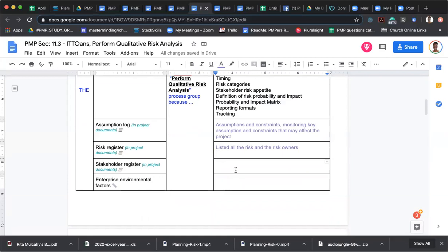Stakeholder register. It will contain the details of the stakeholder, but then also it will contain who might be nominated as a risk owner. Actually, that is where this would come in, rather than the risk register, because the risk register would be more to do with this thing. So we could probably make a change over there, Tasha. The risk owner part, we could probably scratch that out, because the risk register would basically quantify what the risks are, the different properties and the characteristics of the risk.